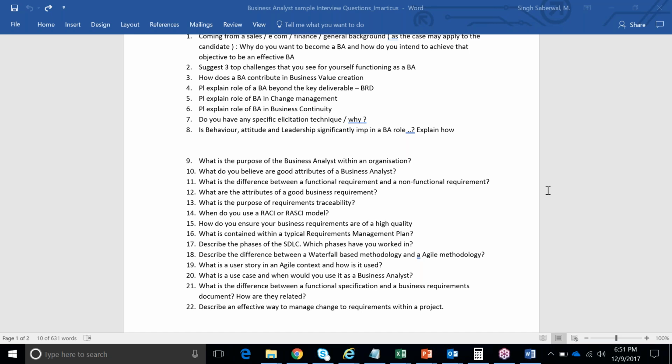The other one is accountable. Now, what is accountable? Actually, first of all, what is the doer part? The doer part is who's leading the initiative, who's leading the discussions, arriving at the conclusion of the requirements. That's the BA. Accountable: who is accountable for this entire game plan? Is it the BA? But the BA is the doer. Who's accountable for the fact that the BA should get all the information? That is the stakeholders. So A goes to stakeholders, R goes to BA.